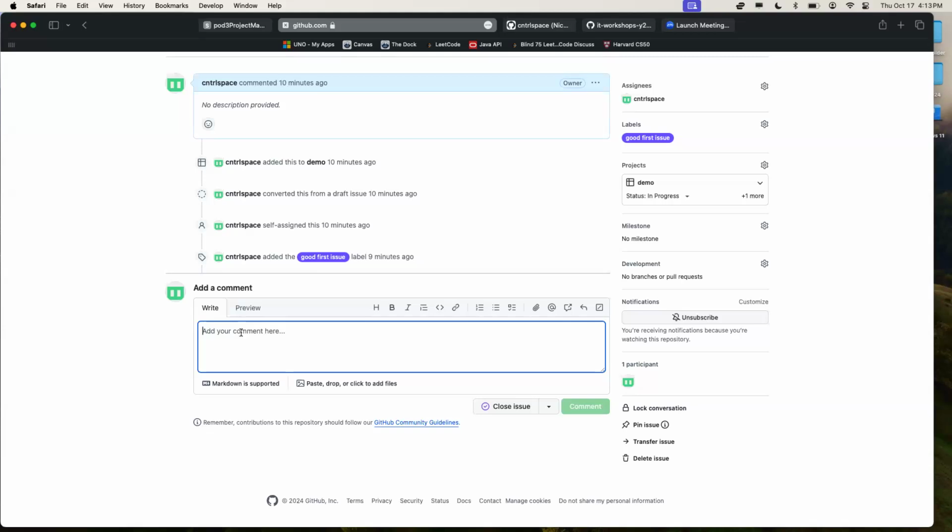You can create sub issues within the issue. So the overall issue is the first tag that you would hit, and then when you open it, you can see all the sub issues in it. That would also come down to how your team wants to organize them. Sometimes you might want to specify those into different tasks if they can be split apart and worked on separately.